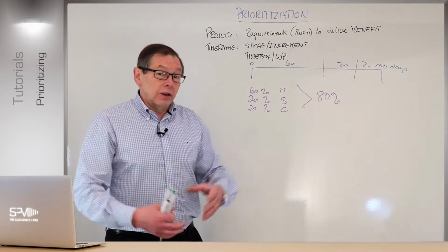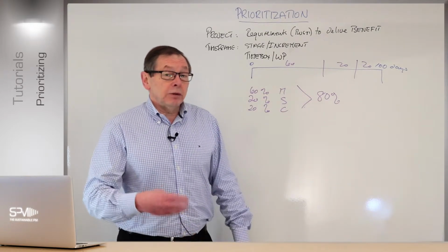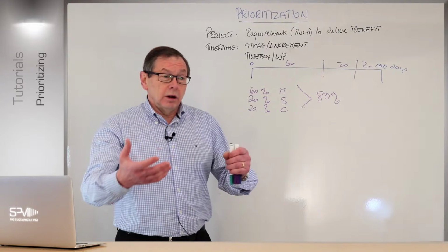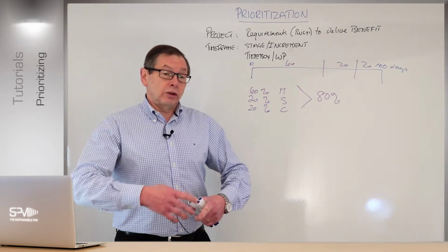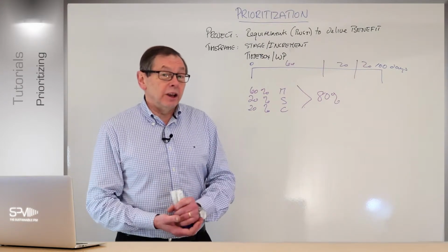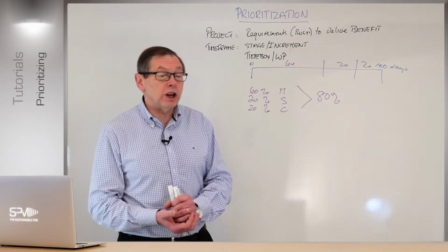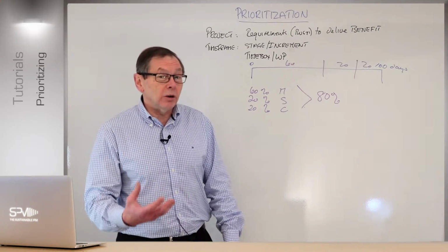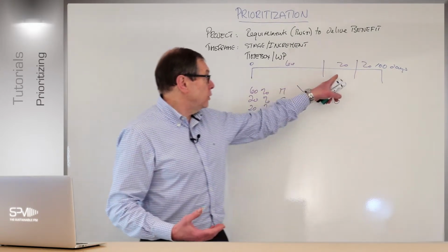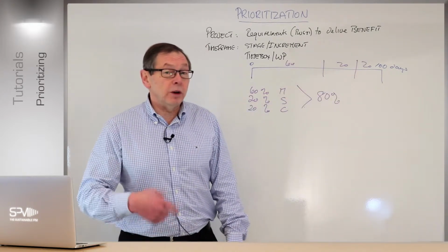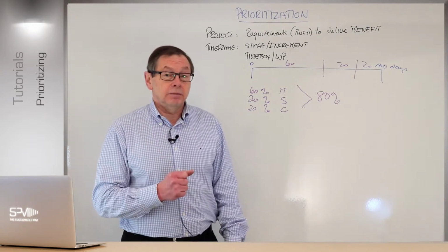Now, as I said, there are things to consider about how much I need to have. So think about a change in a bank, for instance, like the one with the bank teller system. You've got a series of musts. If you're looking at legislative change, it becomes a little bit more critical, because legislative change, compulsory change, and compliance change might end up showing you've probably got far more of your musts, very few shoulds, and probably very few coulds, because probably 90 to 95% of your requirements must be delivered, right?